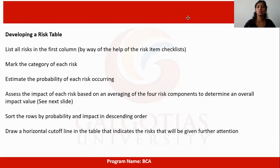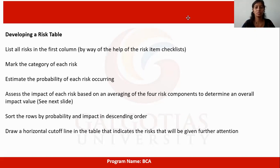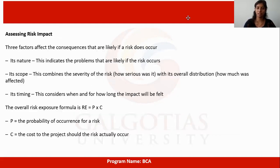Developing a risk table involves listing all risks in the first column using a risk item checklist. Mark the category of each risk, estimate the probability of the risk occurring, and assess the impact of each risk based on an averaging of four risk components to determine an overall impact value. Sort the risks by probability and impact in descending order, then draw a horizontal cutoff line indicating which risks will receive further attention.